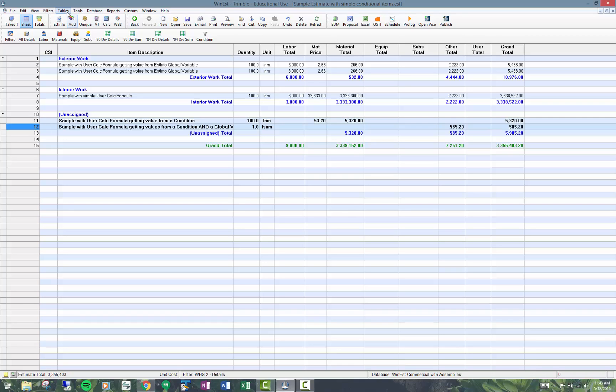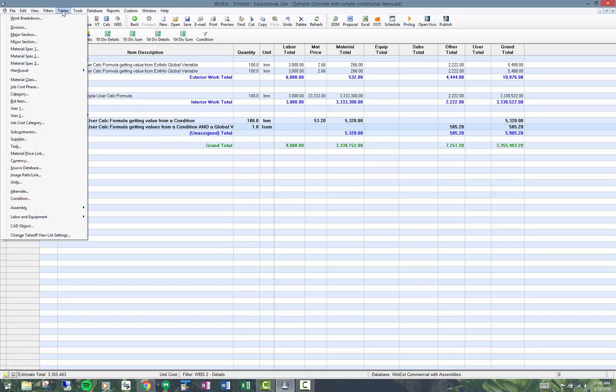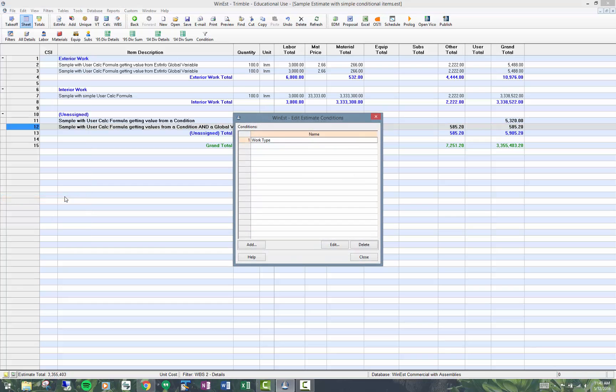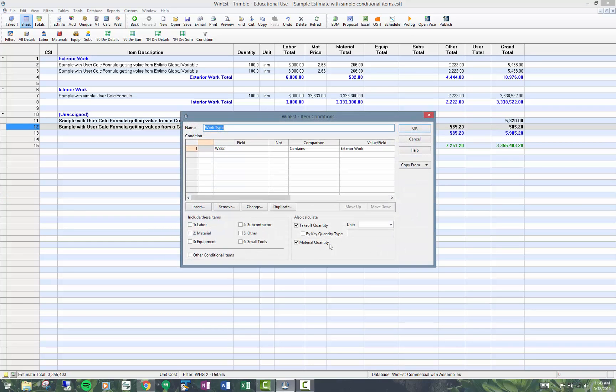The last thing I want to show you is where I set the conditions. It's tables condition. I created this earlier, work type condition. All I said was that this condition is where WBS2 contains exterior work. That's the value I'm getting up here.